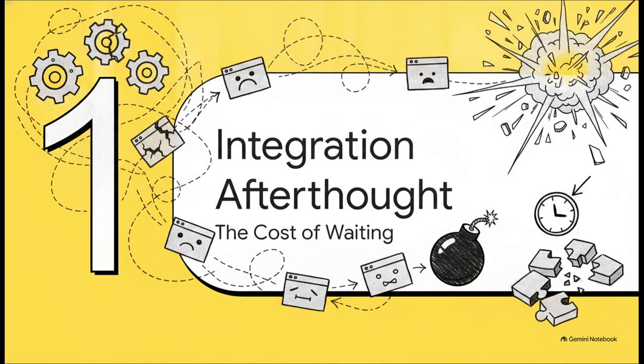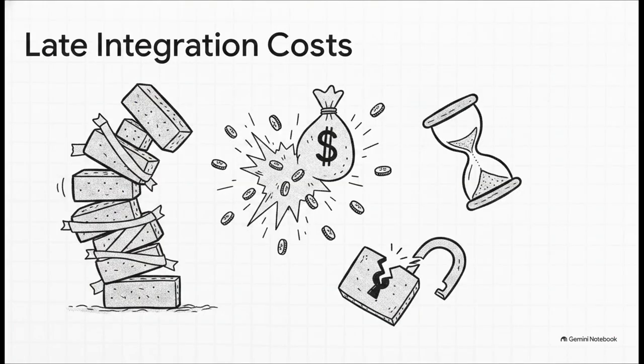Section 1. The integration afterthought. You know the drill. When integration is treated as just some final bolted-on step at the end, the penalties are absolutely brutal. Industry data actually shows that fixing a fundamental design flaw in production can be up to 100 times more expensive than just addressing it early on a whiteboard.